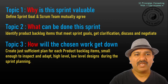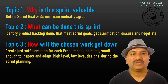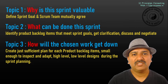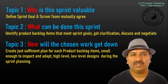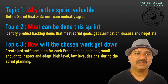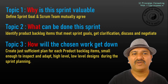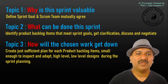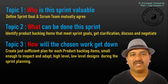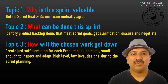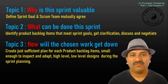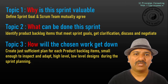The Sprint Planning is divided into three topics. The first topic is: why is the Sprint valuable? Here, the Product Owner defines the Sprint Goal, and as a Scrum team, they mutually agree whether the Sprint Goal is meaningful, achievable, and valuable.